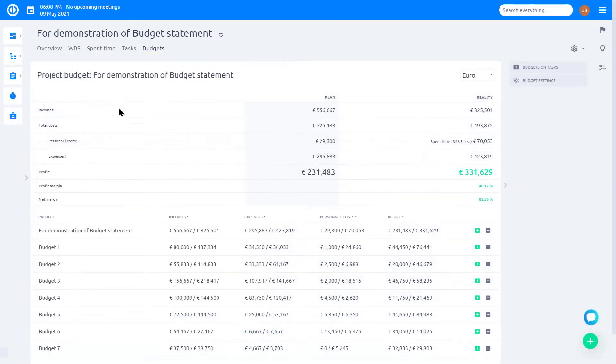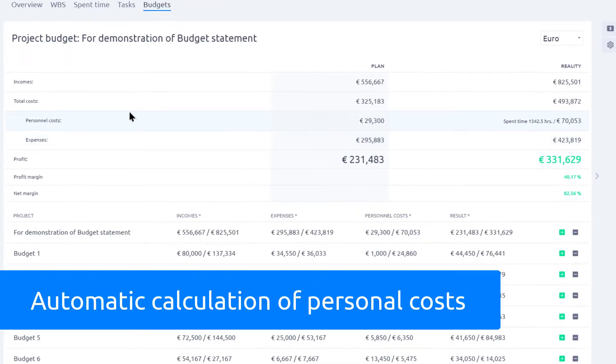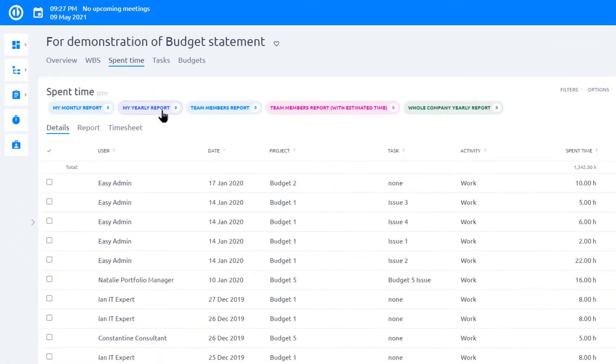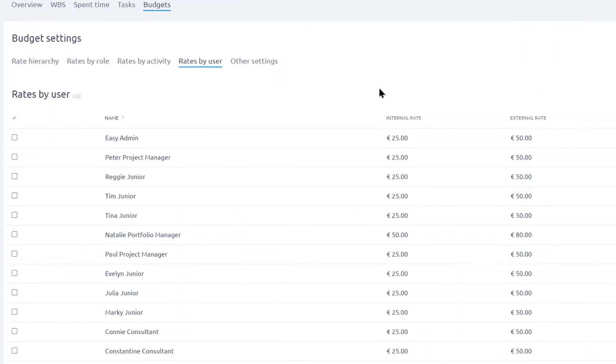The key feature of Easy Redmine is automatic calculations of personal costs, which are based on number of hours logged by users in Easy Redmine, and set hourly rate, which together gives the total personal expense.